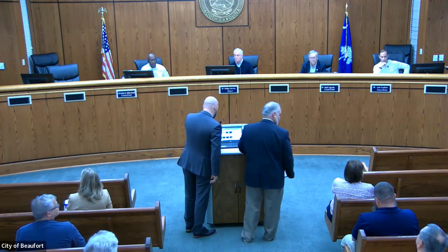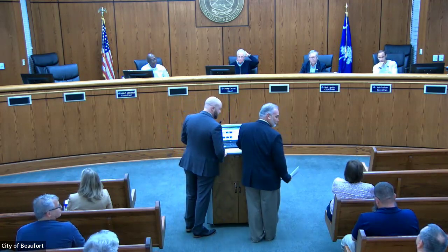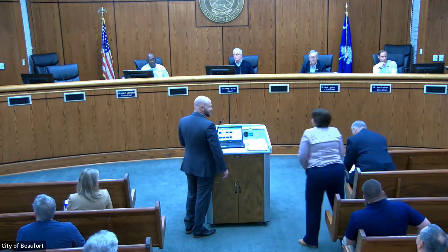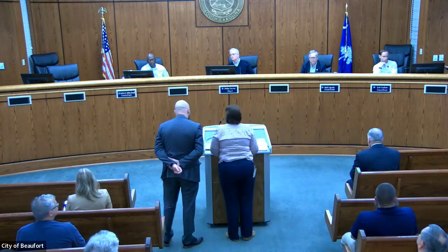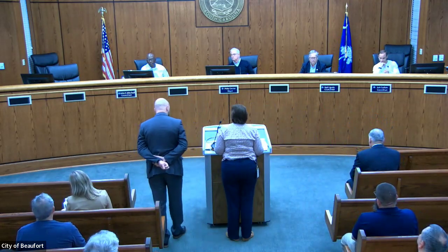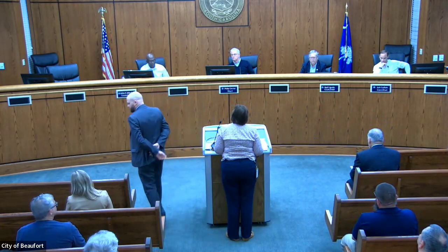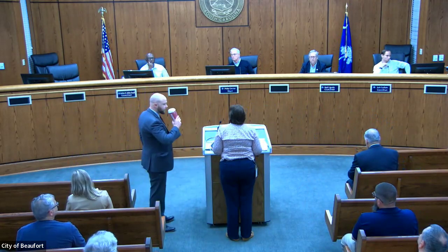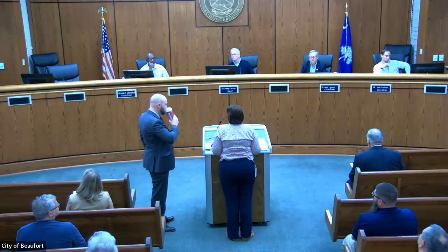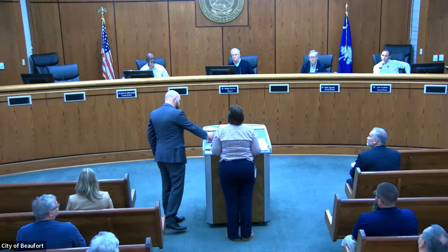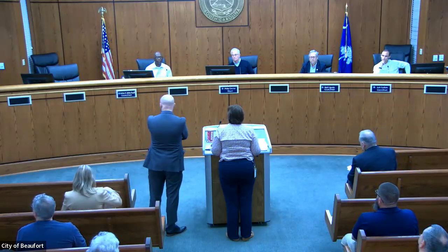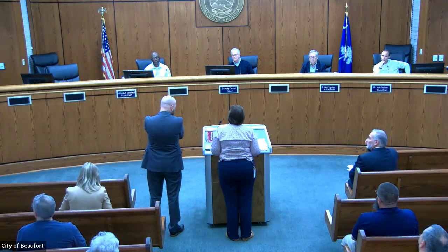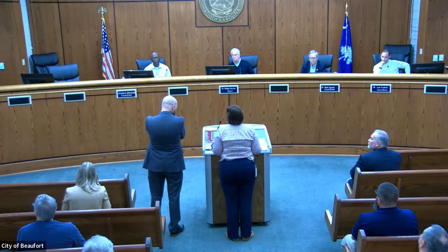Linda, do you want to give the update on the Arsenal wall repairs, kind of where we've been? So on the Arsenal walls, we've had an assessment of the wall several years ago, within the last 5 years, that it was broken down into 2 phases. That entire project was more than what we wanted to take on. It was well over $600,000 at the time. We wanted to break it down into phases.